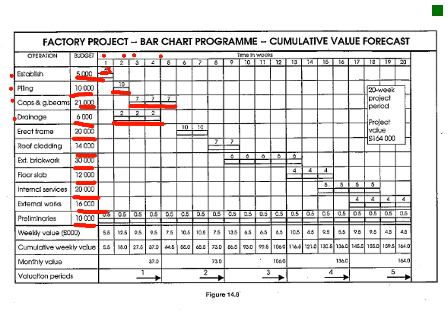You can see they made it very simple. They just divided it by the amount of time that you actually spent on it. You can actually go into more detail and divide it more evenly. If you're using a program like CCS or Microsoft Project, you can actually do it very accurately, where in the first week you will have more expenditure than say in the second week. You will have more resources allocated within the first week than in the second week.